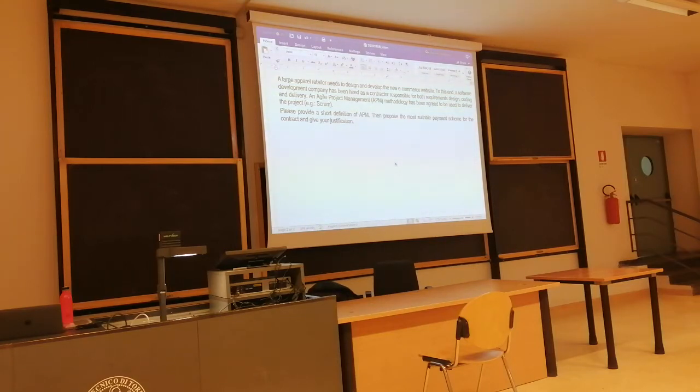In Agile Project Management, what you pay is the time people will work on developing the software. When the budget is finished, the firm fixed price will pay for a certain number of sprints. Each sprint is 4 weeks long. You set up a budget that is likely to pay for all cost of development, for all requirements. If requirements change and there's no more budget, the development team stops and delivers what it was able to deliver.